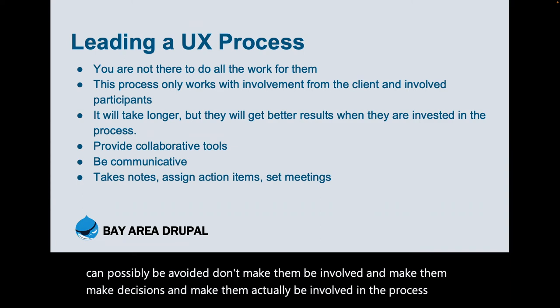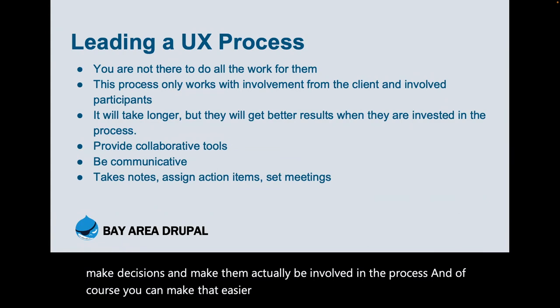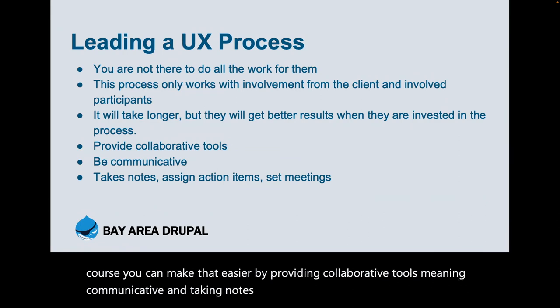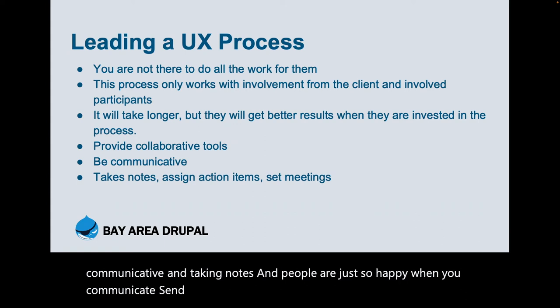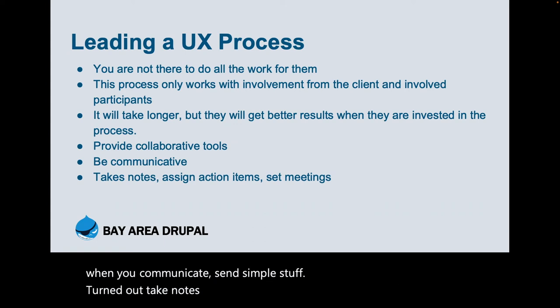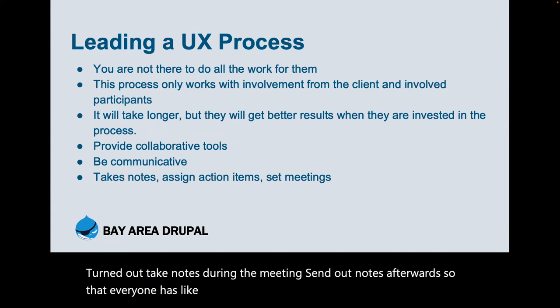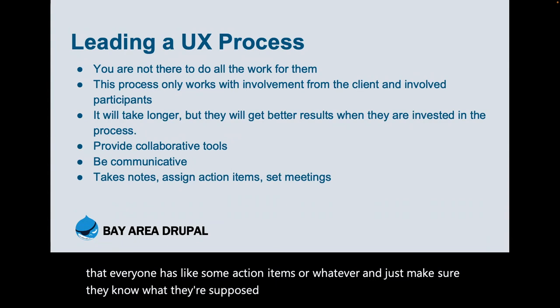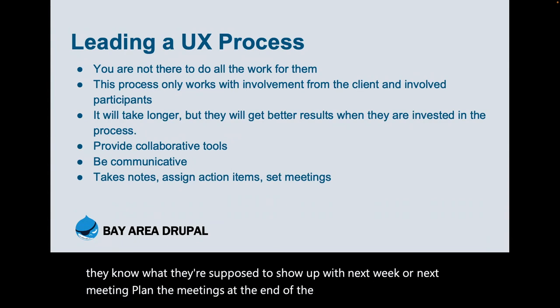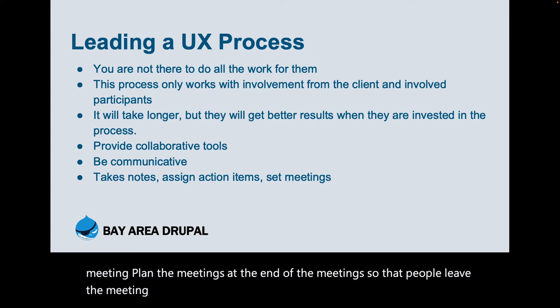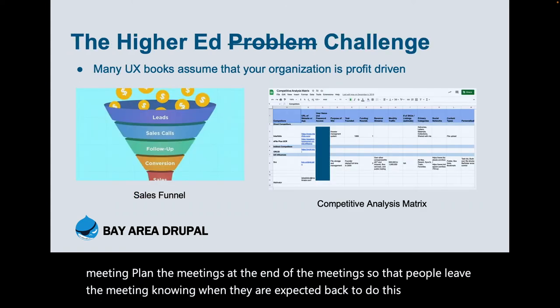And of course, you can make that easier by providing collaborative tools and being communicative and taking notes, and people are just so happy when you communicate, send simple stuff. Take notes during the meeting, send out notes afterwards so that everyone has some action items, and just make sure they know what they're supposed to show up with next week or next meeting. Plan the meetings at the end of the meetings so that people leave the meeting knowing when they are expected back to do this stuff.